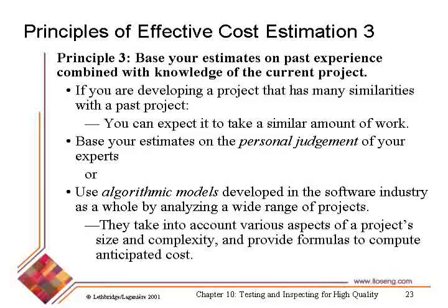Base your estimates on past experience. Go back and look at how much time these various things took in previous projects. Get an idea for that. If you estimated previous projects and your estimates were off, well, fix your estimates this time. That's why measurement and metrics are very important. You've got a history of how much time things actually took. That'll help you to fix your estimates next time.